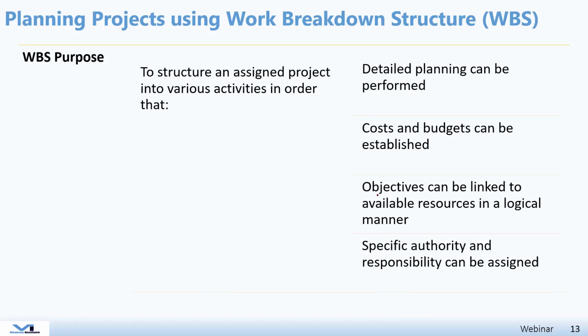And then you start estimating the duration, the resources, and the budget of each one of these tasks, linking between them in order to come up with a plan for your project, the entire project duration, and how you are going to manage your project. And to do that, frankly speaking, you need more of your left brain because the WBS is more a technical tool than a communication tool. So here you will talk about the cost estimation, the budget estimation, the duration estimation. And to do that, again, you need to have high-level competence in analysis and calculation and such.